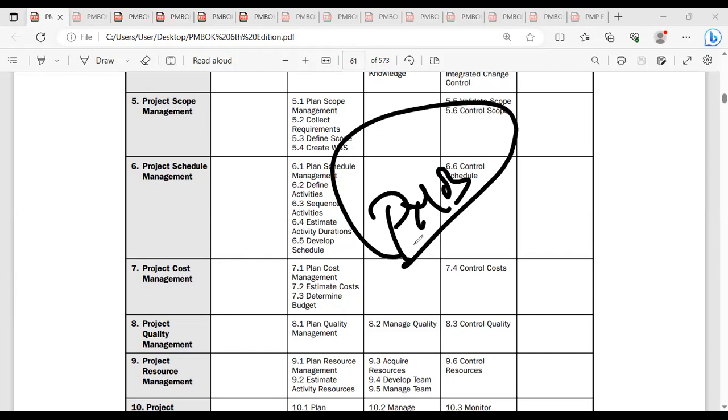This all should be integrated before you're going to give the complete management plans to the execution. Make sure that all the management plans are properly integrated, and you need to make sure that all the baselines are properly established. They should get the approval, and they have to be integrated. Once you're integrating all the three baselines, you will get something called the performance measurement baseline.